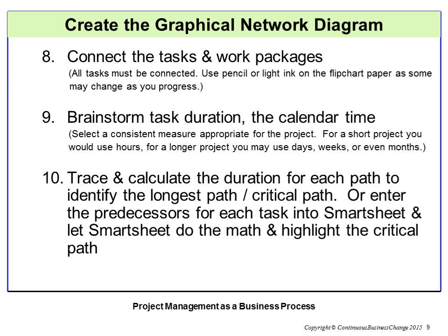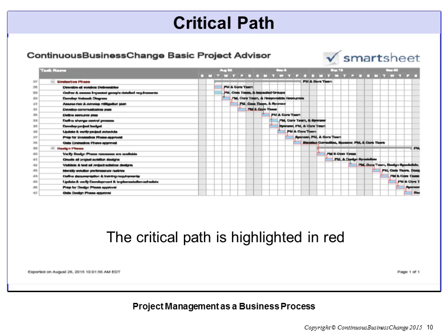Trace and calculate the duration for each path to identify the longest path. That's the critical path. Or enter the predecessors for each task into Smartsheet and let Smartsheet do the math and highlight the critical path. This is an example of the critical path highlighted in red in Smartsheet.